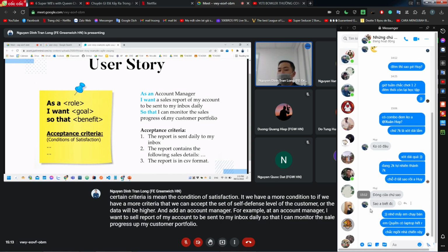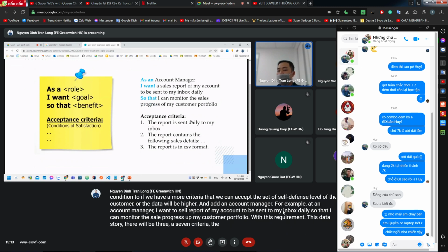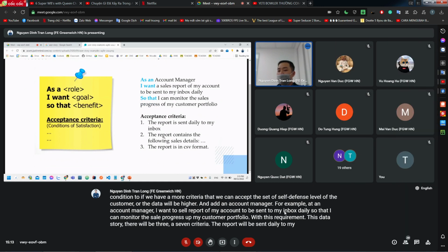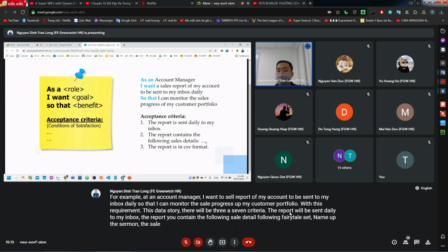With this requirement, this user story, there will be 3 acceptance criteria. The report will be sent daily to my inbox. The report will contain the following sales details: the name of the salesman, sales age, sales email, sales address, sales mobile phone.